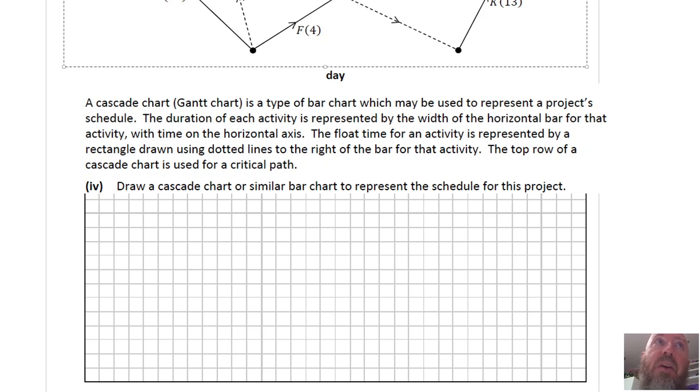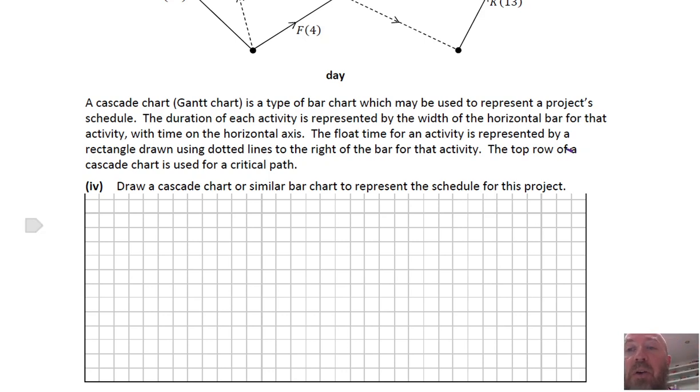So if we don't know what the critical path is before we start, we can't just put stuff on the top row and say that's the critical path. We just ignore that line. So we are pretending. That's the bit I need to talk about. We are ignoring that because we don't know what it is, and we can't know what it is until the end. But if you do know, because you have done the early late time already, you can just put those activities in at the top, and I'll talk to that in a bit.